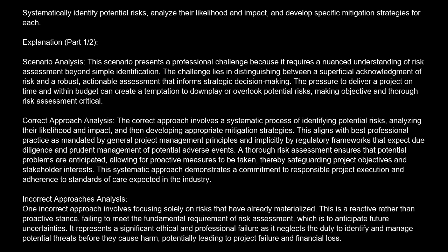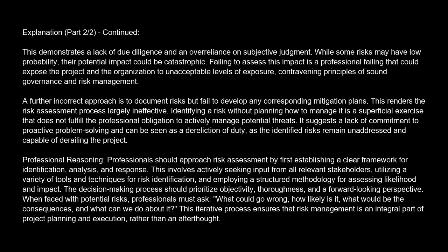Another incorrect approach is to dismiss risks that seem improbable without a formal analysis of their potential impact. This demonstrates a lack of due diligence and an over-reliance on subjective judgment. While some risks may have low probability, their potential impact could be catastrophic. Failing to assess this impact is a professional failing that could expose the project and the organization to unacceptable levels of exposure, contravening principles of sound governance and risk management.